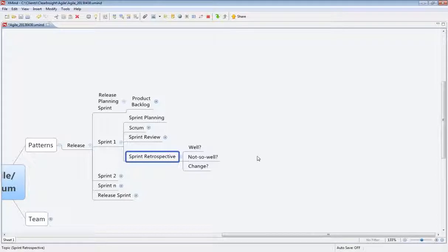Here, we're building into our process that every 2 weeks we take a moment and say what went well, not so well, and what do we want to change. And it could be something as simple as, we're sending too much email. Or, I'm not really sure that these meetings are all that useful. Do we need all these meetings? There's a lot of really simple things that someone suggests, an observation at the time, and it's a small course correction, but over a long period of time, those really add up. So this is why we try to leverage that.